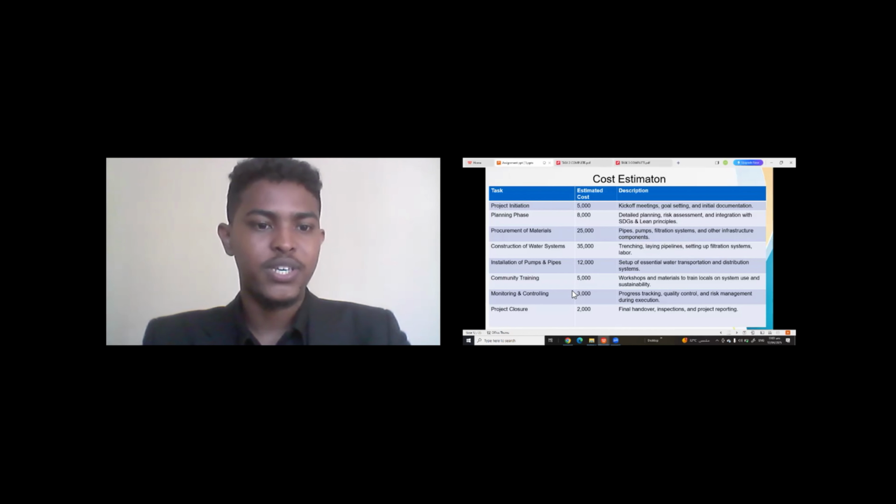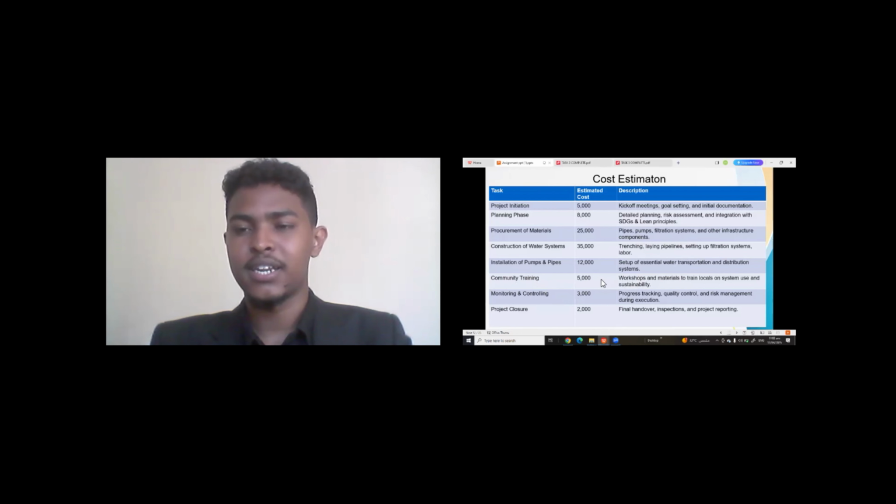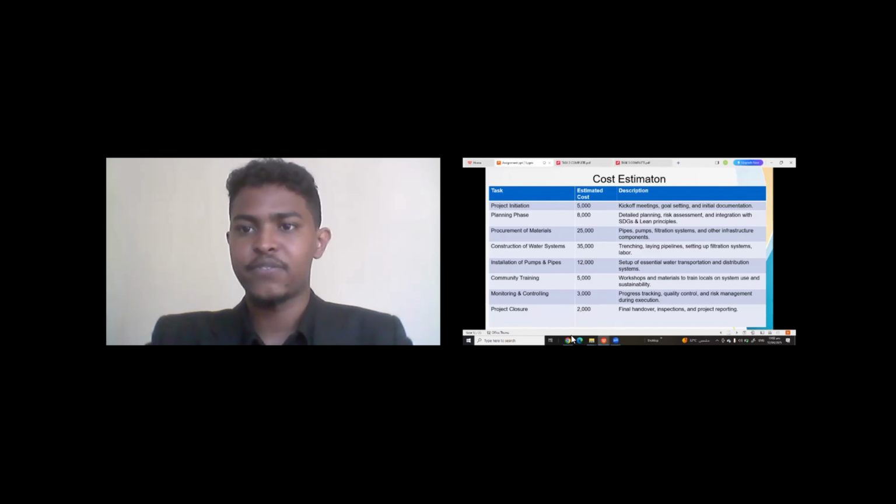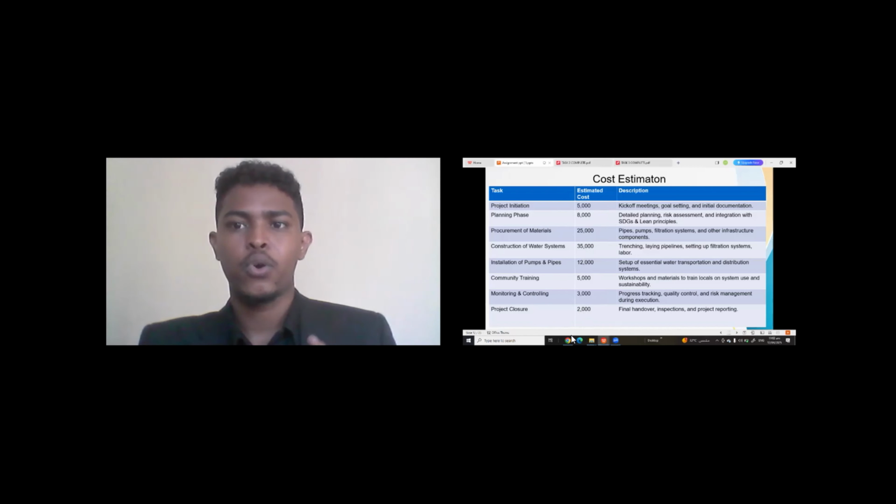If you go through, we can also see that we planned something for community training. This community training includes workshops and materials to train locals on the system use and sustainability, and it has an estimated cost of 5,000. The least costly part, which is the project closure, has an estimated cost of 2,000, and this phase involves the final handover, inspection, and project reporting. So if we total this estimated cost, it will be 95,000, which is the overall cost of this project.